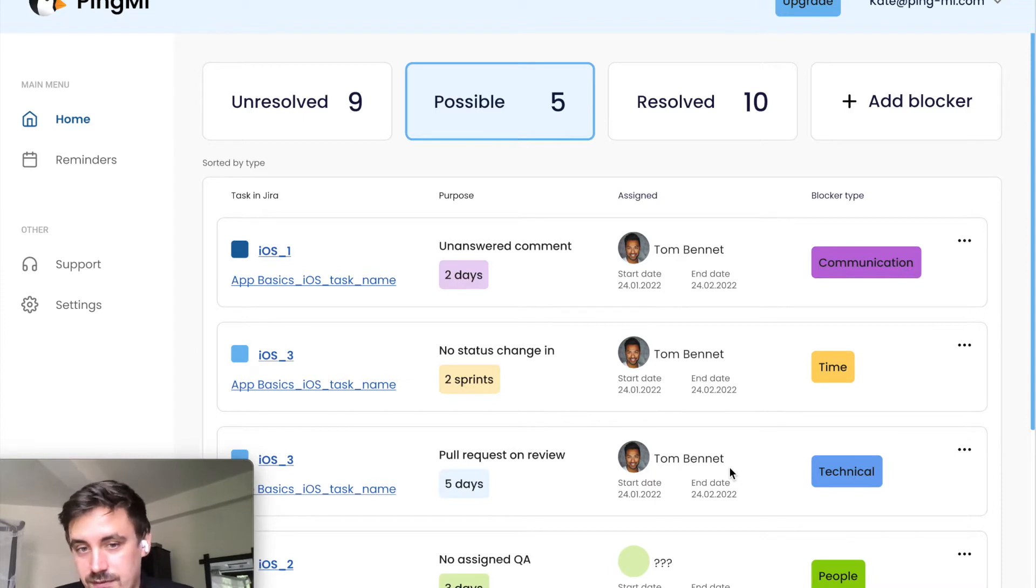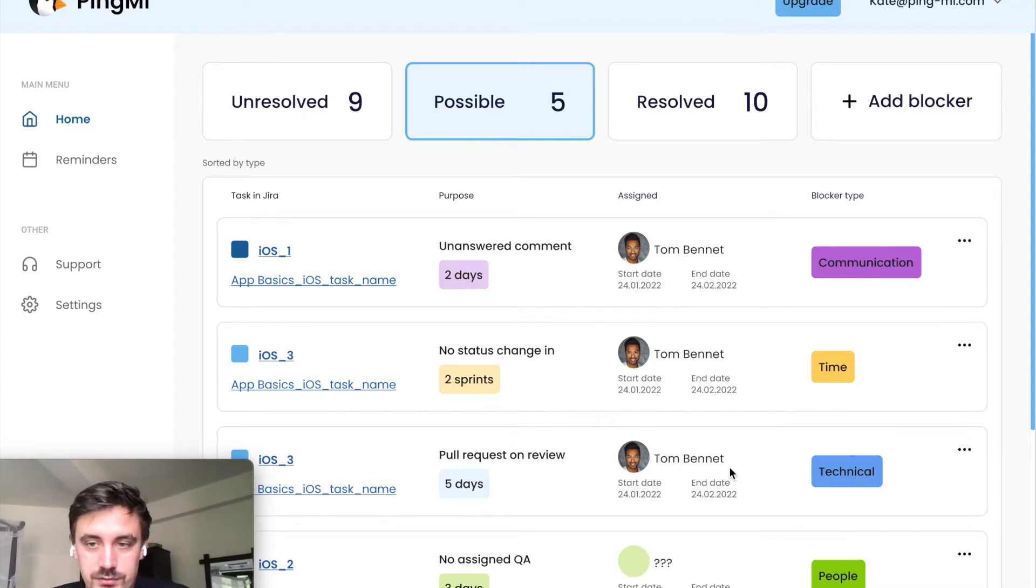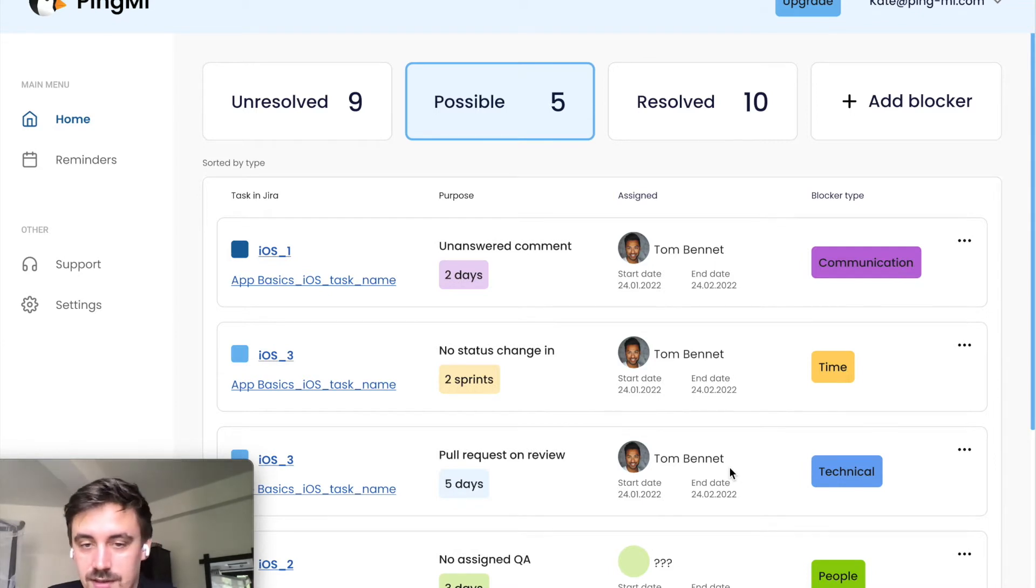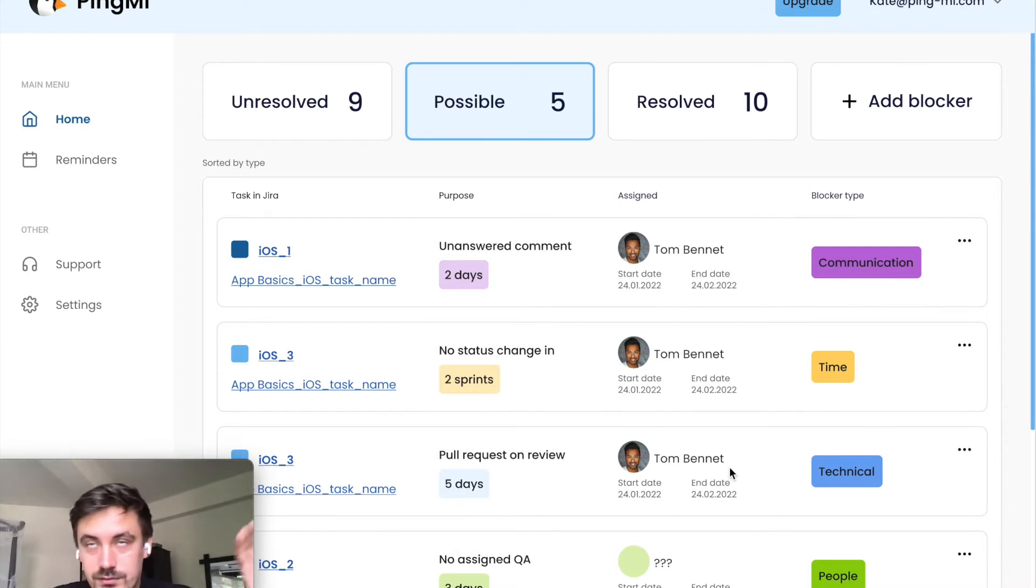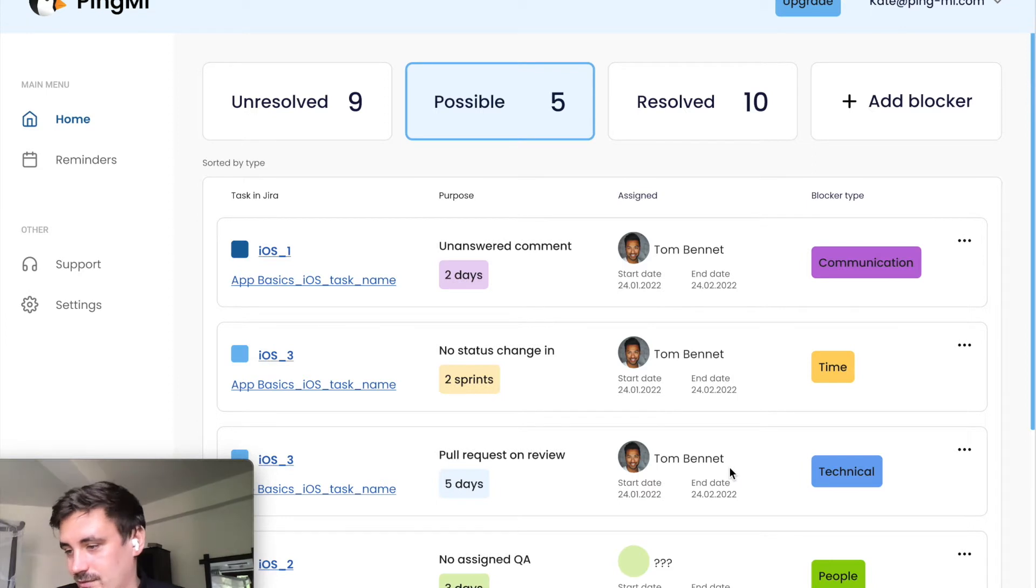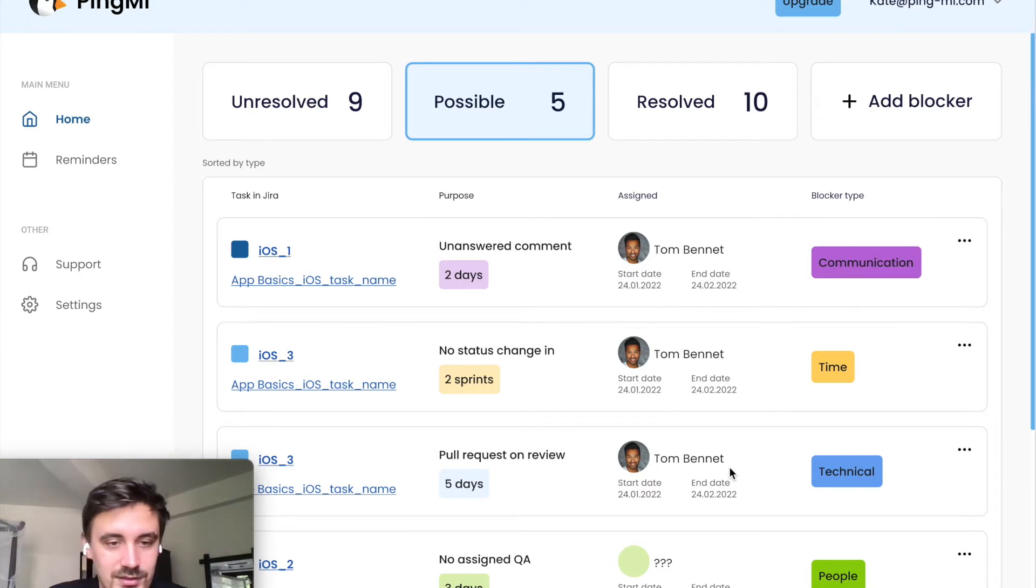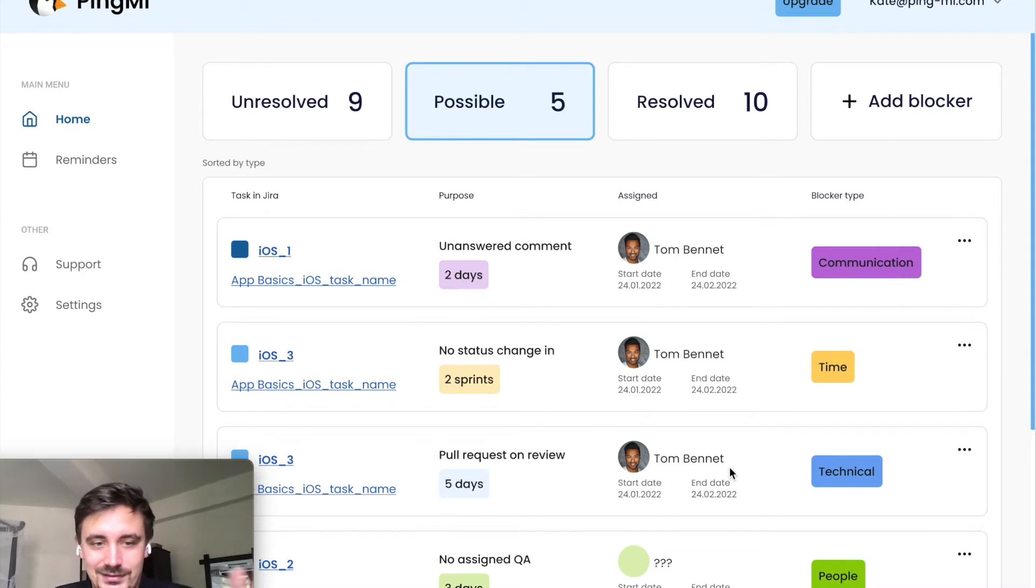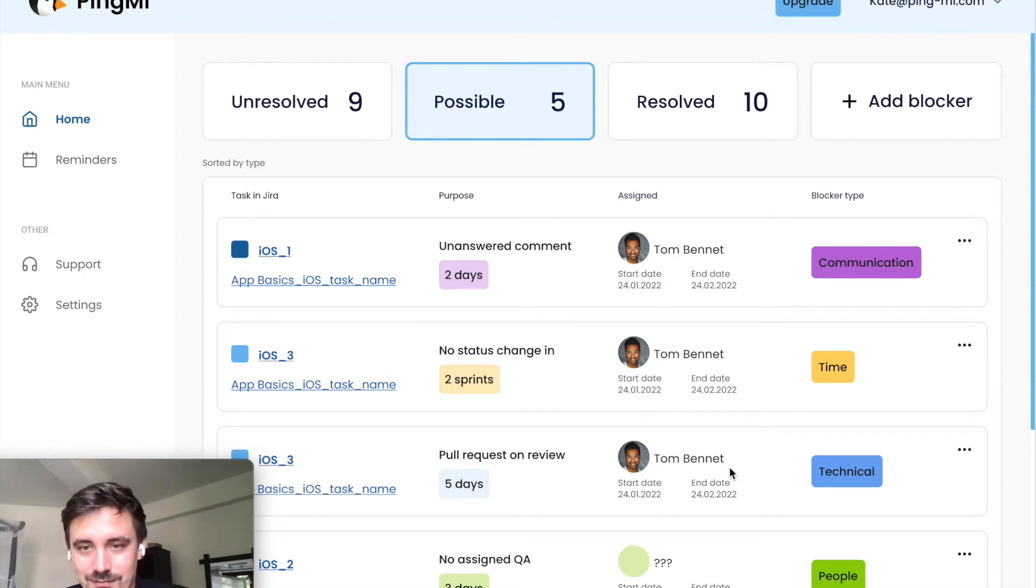It can be different types of blockers. For now, we focus on four types. First one is communication blocker. For example, someone posts a comment in Jira, and for example, a designer posts a comment in Jira, the engineer forgot to read the email and it can stack for a long time. We will show it here.